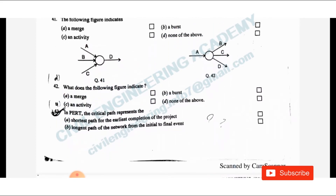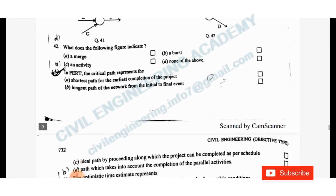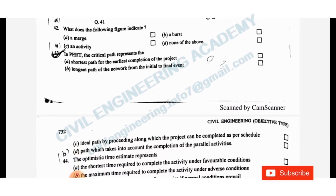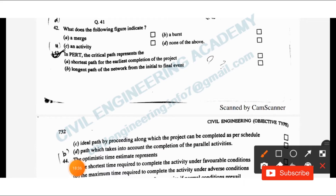Question 43: The critical path represents which of the following? Option A: shortest path for the earliest completion — not correct. Option B: longest path of the network from the initial to final event. The critical path is the longest overall duration path, which gives the shortest time possible to complete the project. Option B should be the answer.